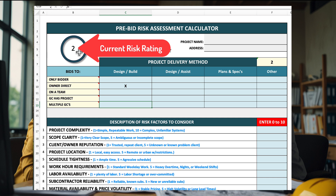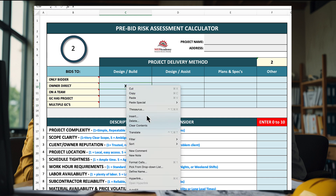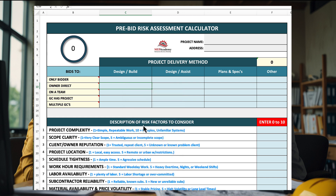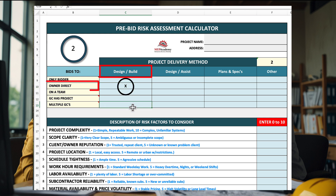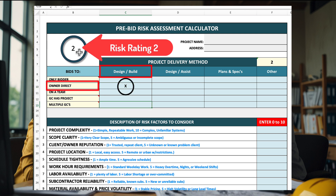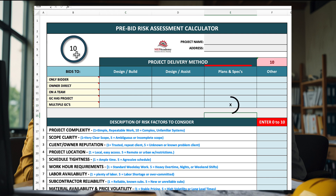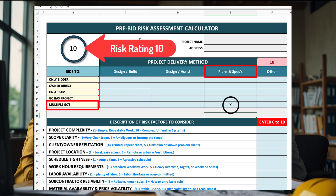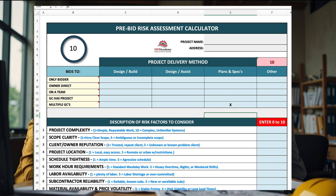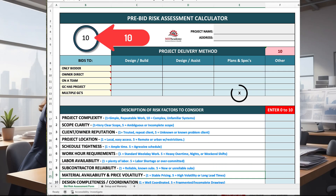Just place an X in the box that matches your scenario. The sheet will automatically assign a pre-weighted risk score based on how favorable that setup is. You can change these values to match your risk profile by entering your values in the chart off to the right. The best case scenario: design-build and owner-direct — low risk, high success rate. The worst case: plans and specs with multiple GCs — highly competitive, low odds, and high risk. This quick check helps you instantly know how strong your starting position is before you invest time estimating.